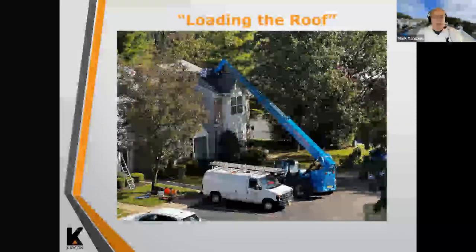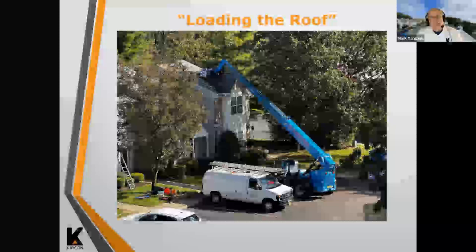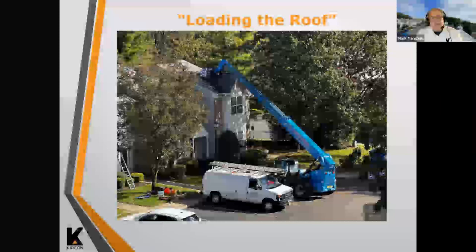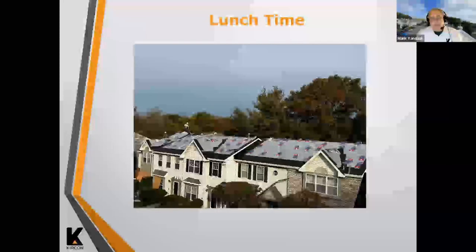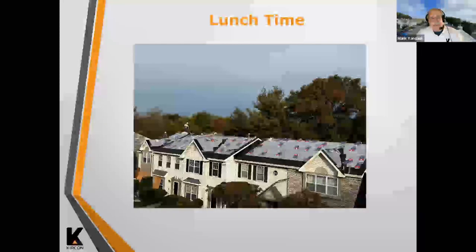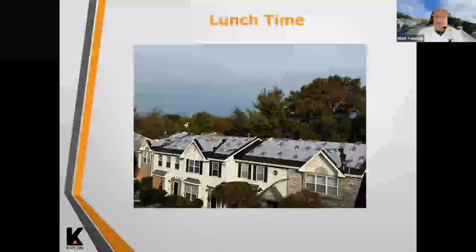So what I just showed you — demolition, replacement of plywood, prepping for exhaust fans, installation of ice and water shield and underlayments — all occurs in the morning of a typical day. By noontime they're starting to load the roof with the shingles. Around lunchtime — 12 to 1 o'clock — you'll see that all the underlayments are down and the roof is loaded. This is usually the breaking point where most roofers will break for lunch and then come back and start installing the shingles.